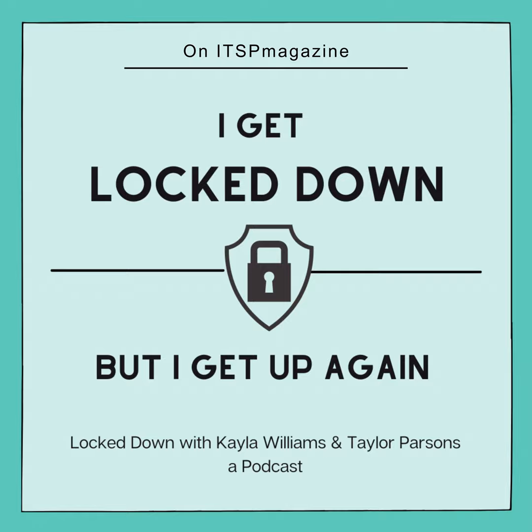When I've done this in the past, I have set OKRs. I prefer to go that route. That's objectives and key results, if you're not familiar with OKRs. For example, one very common OKR is going to be the objective of evolved security culture. I think every single CISO I've ever spoken to has had that remit within your first 30, 60, 90 days. So that's the objective. The key result could be to execute comprehensive security awareness training, achieving 75% completion or 100% completion by a certain date. And then what's your criteria for completion? Who are your dependencies? Have you met that goal by that date?